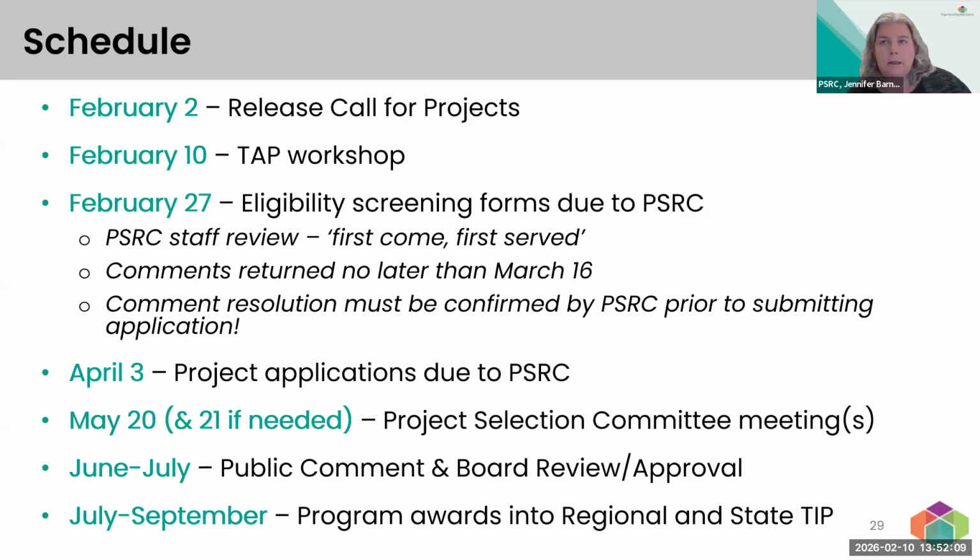You would need to look at the obligation date. You need to work backward from when the construction is scheduled. There is a window between the completion of obligation and the project going out to ad. But absolutely, the obligation deadline is June 1st.